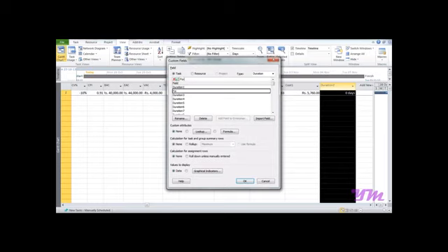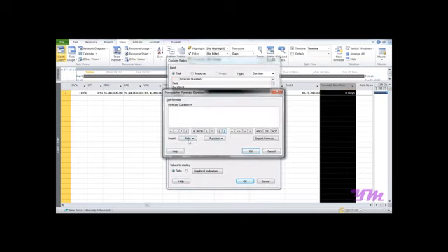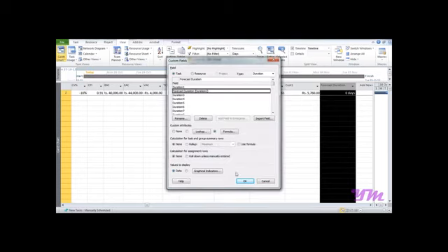So go on to this part, add new column, select say duration 2, go on to custom fields, say we want to give it the name forecast duration, go on to formula, field duration divided by field cost, here we would be having SPI, and click on OK. So now we can see over here the forecast duration comes out to be 12 days, exactly as we had seen in the manual example. So this is all about working with project monitoring using earned value concept in Microsoft Project 2010.